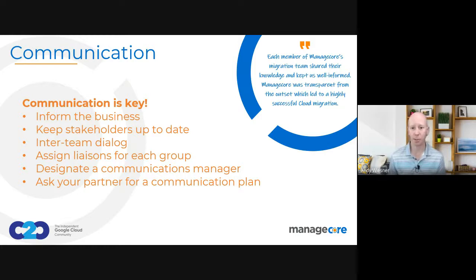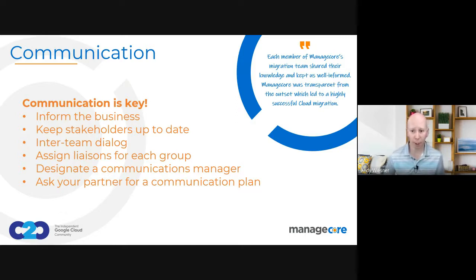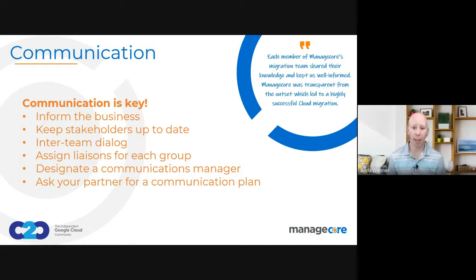Communication between teams is also really important, and this becomes even more critical the larger your organization is. I've seen many companies where IT and business teams are very siloed — with designated network, infrastructure, security, audit, and application teams. If those teams are not talking to each other, you can miss key pieces. For example, the application team moving an application into the cloud may not ask the network team to open specific firewall ports, and after migration there's a breakdown because of that lapse in communication.